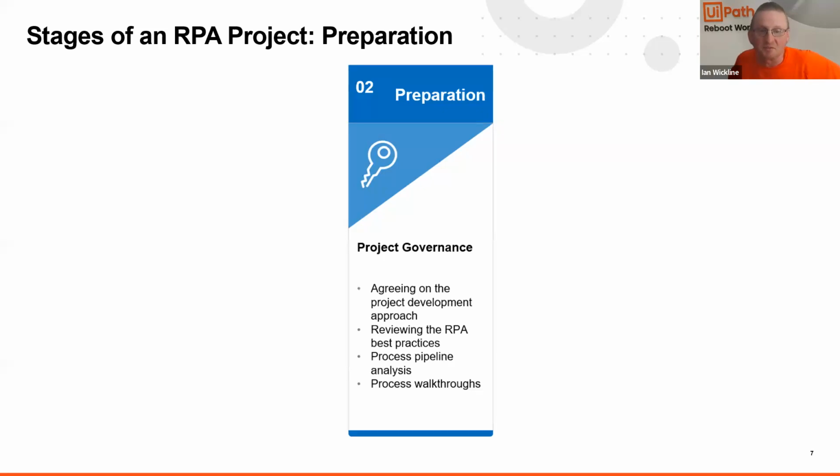This idea of process walkthroughs is an interactive session where the project team and the stakeholders actually sit down and review and validate the automated processes before we move to deployment. The dev team presents the automation workflows, providing a step-by-step demonstration of how the processes will ultimately be executed via the robots' actions. The purpose of a process walkthrough is to gather feedback, ensuring that the automation processes accurately reflect the desired business outcome, and to address any potential concerns or issues from our stakeholders at that point.